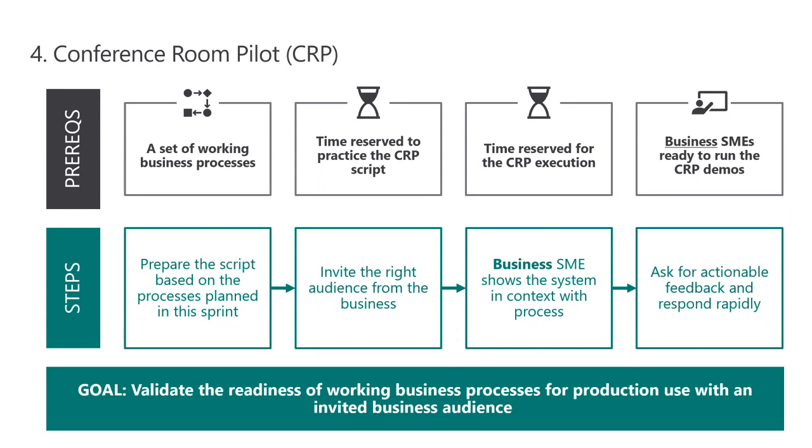So roughly for a 4-week sprint, you would expect a conference room pilot to be maybe a day and a half. It's quite a commitment, right? But you need that amount of time to go through the processes in sufficient detail. You need to be able to invite the right audience for the right work stream. There's no point inviting 30 people from the broad audience when you're going to be talking about some specialist tax design, right? That's not the right forum for that. You need to make sure that whatever you're talking to your invited business audience about is actually engaging for them and that they can give you good feedback. And we can do a follow-up tech talk on how to do this in the right way.